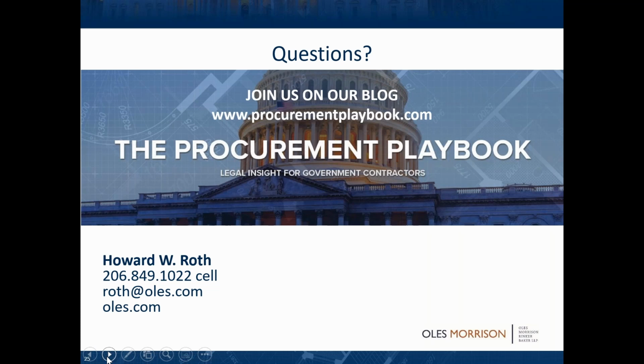If you submit an REA, at the end of it I would typically say, we request your response within the next 45 days, and we stand by to meet with you to negotiate. At the end of that 45 days, you follow up and say, we haven't heard back from you. Are you going to give us a response to this REA or not? And if not, when? And if you still don't hear, that's enough.